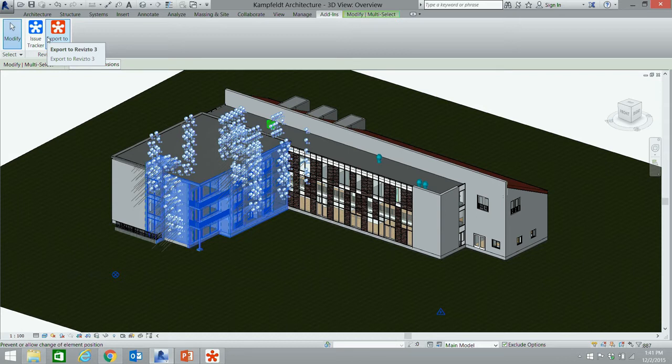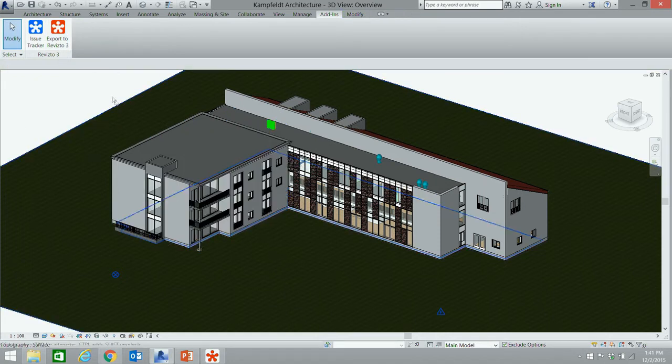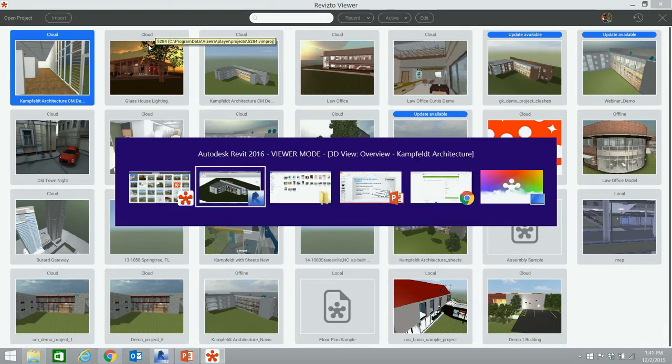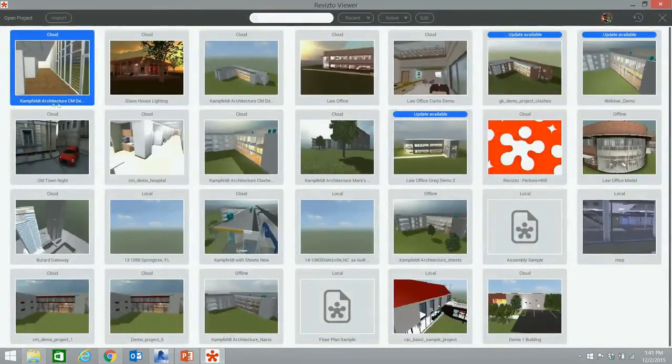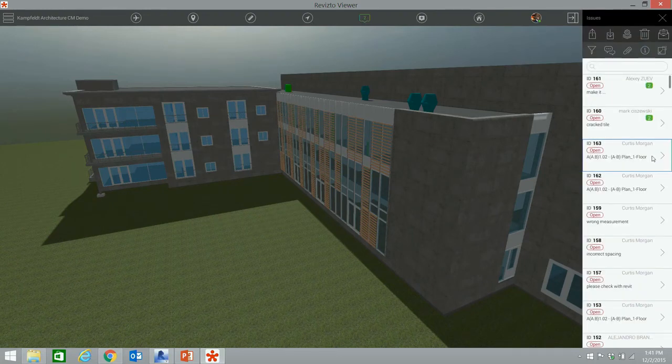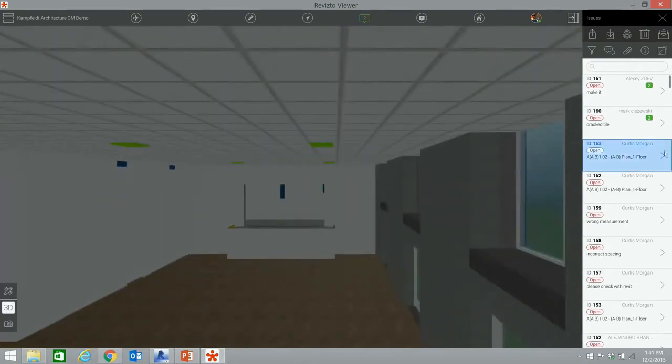And so going off of that point, even one step further with the Redmond company, they're using the model for internal design meetings, and they're also utilizing it for the owner. So they actually have a separate project that's labeled the owner. So they're not putting those issue tracker issues in there. You do have an option to make those private where an individual can't see it, but they don't want their owner getting, if they're changing a design every single day and tweaking little things, most of those aren't relevant to the owner. So they have an owner one that they update, I think maybe once every 3 weeks, with all the changes in there from the Revit model.